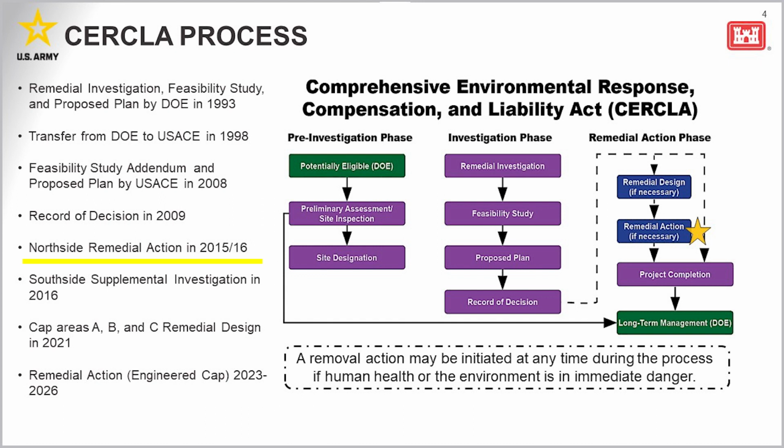In 2015, we initiated excavation and off-site disposal of FUSRAP-related soil beyond the landfill leachate collection system on the Seaway north side. This was completed in 2016 with a total of over 1,100 cubic yards of material excavated and shipped off-site for disposal. A small site that remains, a Southside remedial site, began in 2016. However, that was not finished due to characterization of soils in that area.